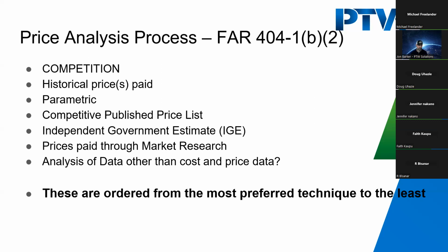They don't really represent the prices that are actually paid. So I've seen a lot of companies get dinged on their price analysis because they were using GSA as a basis, and the NCMA folks were like, wait a minute, these are ceiling rates. How did you use this as a basis? So they didn't like the price analysis from that one client, and that's okay.